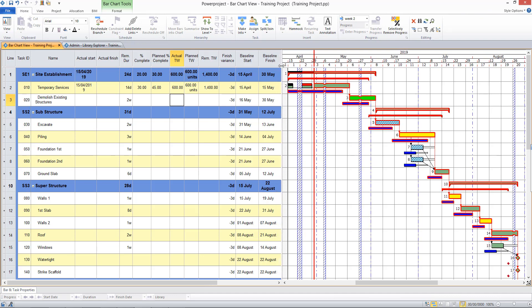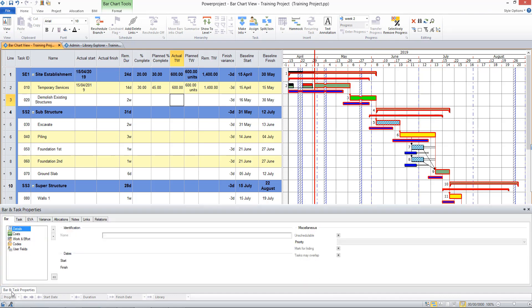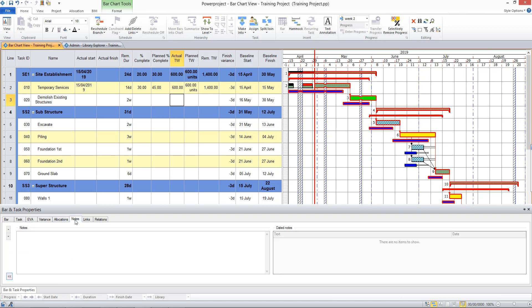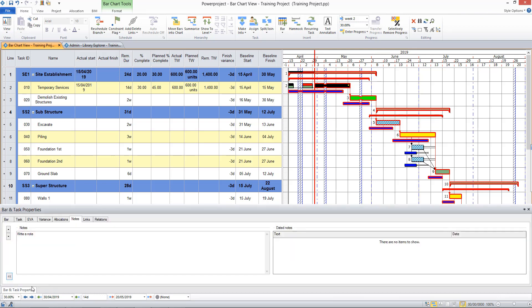If I wanted to record notes to keep records of the delays in my project, one way of doing it is to enter a note into the bar and task properties pane on the notes section. And so if I select a task, I'm able to right-click on the right here to add a dated note.